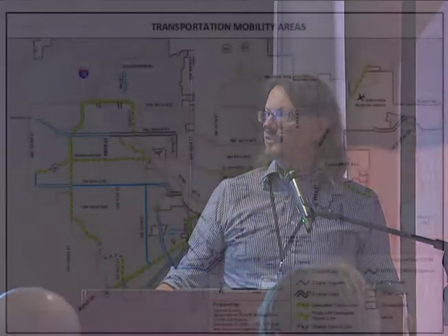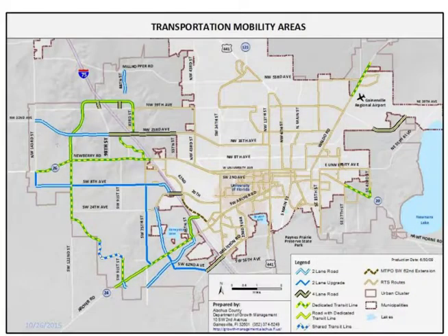It's a long-range CIP, so we have a 5-year CIP, but our adopted CIP is actually a 30-year. So that allows us to look at projects that might not get constructed within the 5-year, but may need, for example, right-of-way longer out. So this is sort of the basis of where we can issue credits, where we can deal with credits. If it's not in the plan, we don't have a way to issue you credit for it, basically.